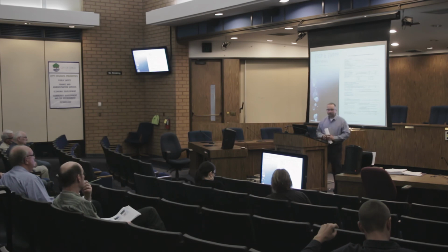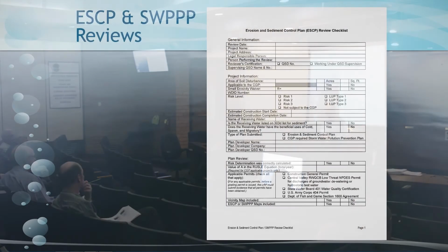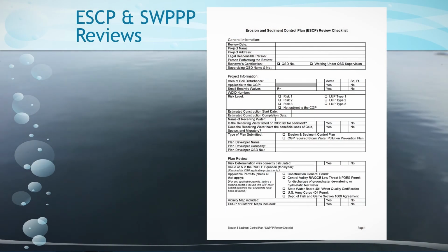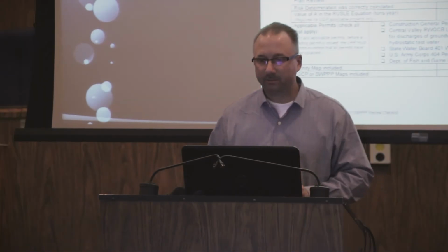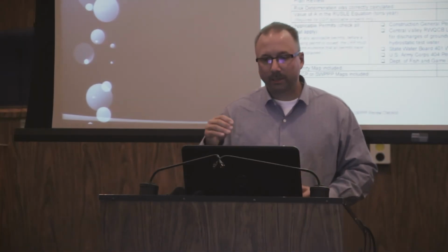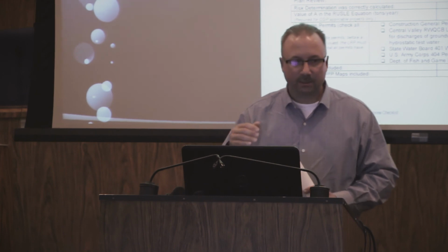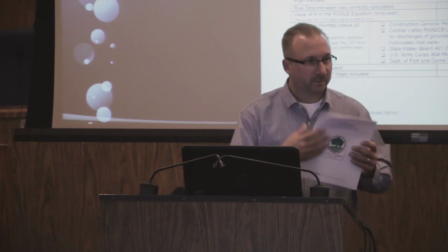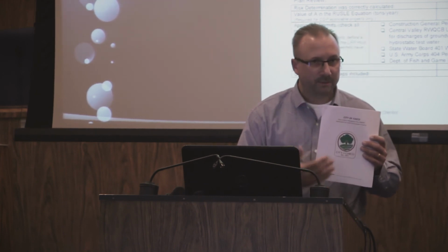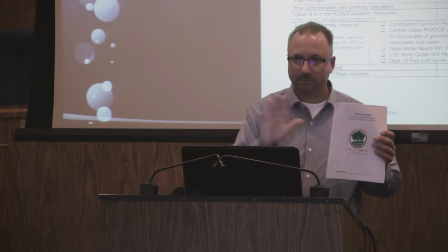Now, they will get reviewed. And so once it gets submitted, the city then does a review of it, and it will be done as the city's permit requires by a qualified SWPPP developer, a QSD, or someone working under that. And so they'll use a checklist like this where they'll evaluate it, and then it actually follows a lot of the same BMPs that were in this worksheet. In fact, that's why we did it.